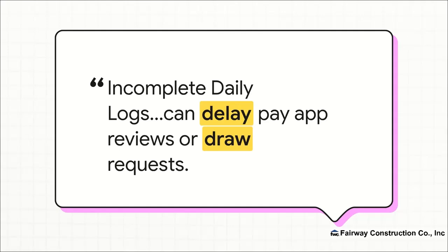And this right here, this shows you the real-world impact. We're not just doing paperwork for fun. An incomplete daily log doesn't just make a report look bad, it can actually hit our project's cash flow. We're talking delays on pay apps and draw requests. What you do in Procore has a real financial impact.